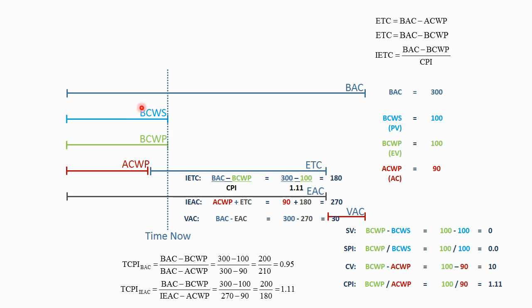We always assess earned value performance based on the original plan. So despite the fact that we're being more efficient, we don't revise this plan. This budgeted cost of work schedule always remains the same, and it always will finish at 300 hours. Likewise, when we take performance, if we finish the project, the most performance we can take is 300 hours. This too never gets revised. What we can revise is this estimate of completion.